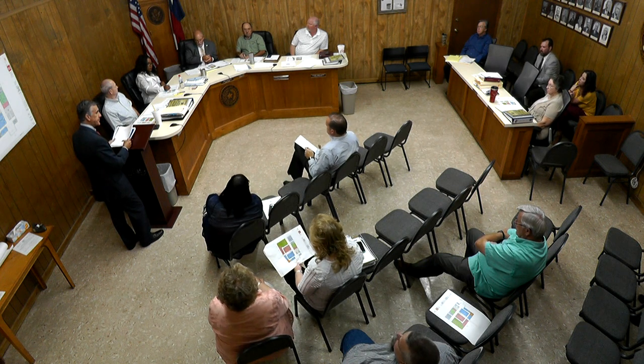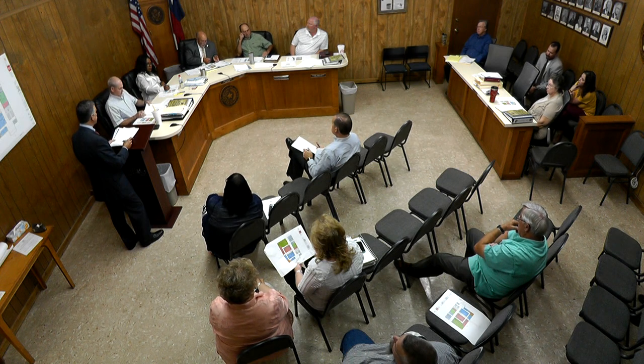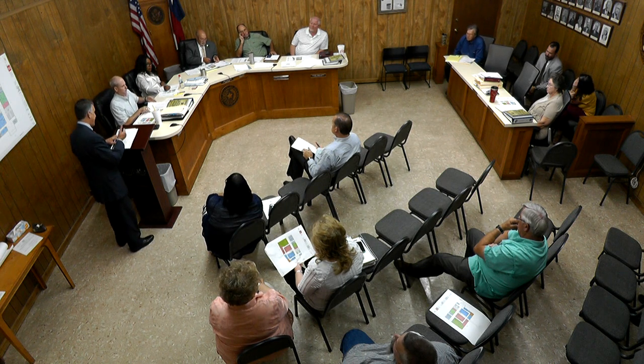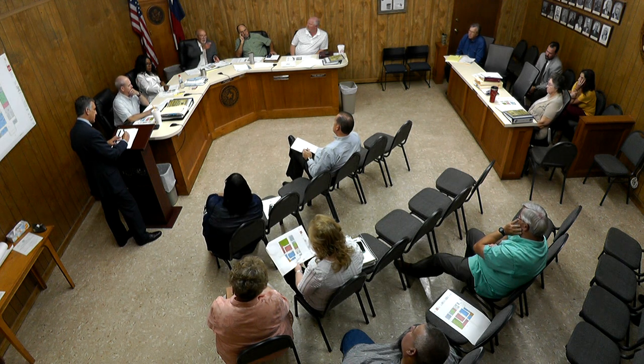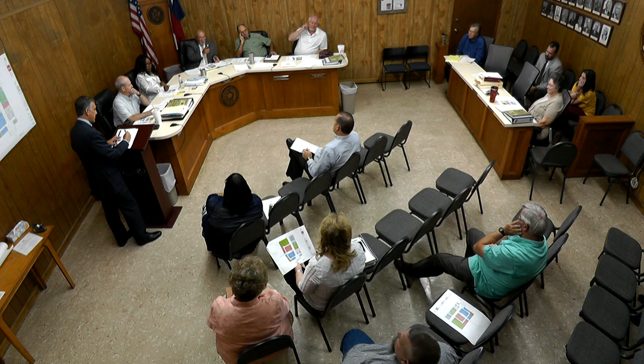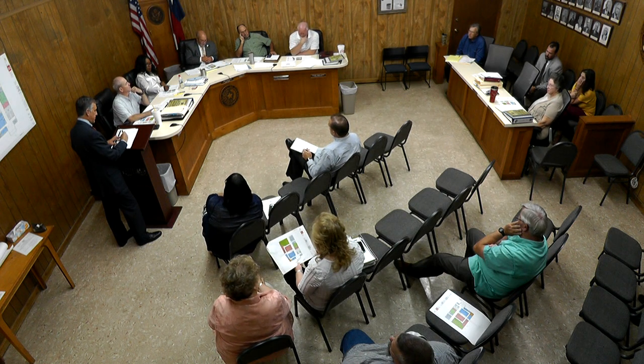I mean, from what we're talking about, if you did the additional 15,000 square foot in phase two, I did it at 325 a square foot. That's 4,875,000. Or, yeah, if we're that close, just say 5 million to work a round number, because I'm sure there's a surprise in there, some covered walkway, or enclosed walkway. That takes it up to 5 million pretty much.